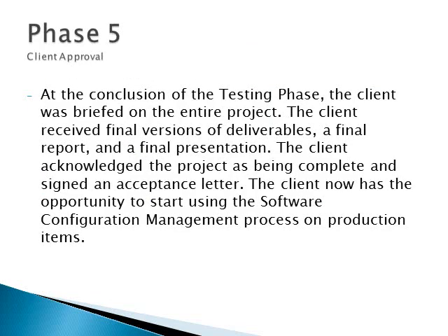Phase 5 was the client approval phase. At the conclusion of the testing phase, the client was briefed on the entire project. The client received final versions of deliverables, a final report, and a final presentation. The client acknowledged the project as being complete and signed an acceptance letter. The client now has the opportunity to start using the software configuration management process on production items.